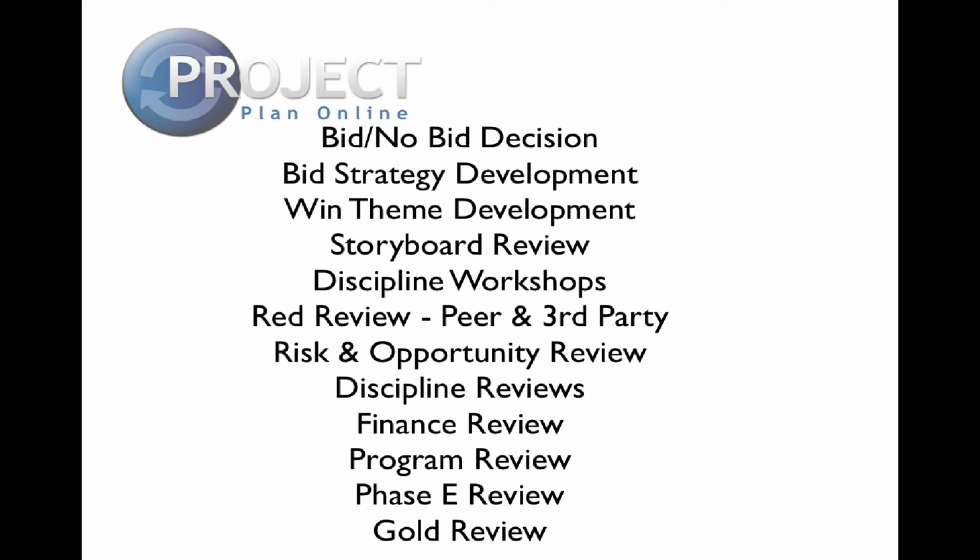So let's look at a practical example of a review and approval process. I'll use the case study as an example, then contrast this with a typical process for a smaller project. In this bid, which remember was for a $2 billion contract, this review and approval process was carried out. Firstly, a bid/no-bid decision, bid strategy, several brainstorming sessions, and because of the ever-evolving nature of the bid, this was pretty much an ongoing process. Win themes, a third-party facilitated workshop that ultimately informed the later review process.